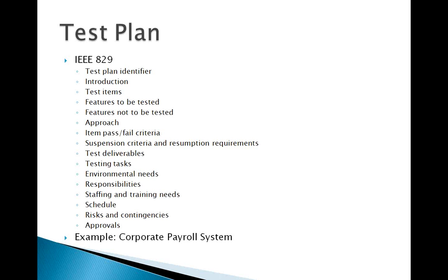once the responsibilities have been defined, you have the number of staff that is needed, and if for this project any particular training need is there. So for example, let's say it's a hosted services solution, where performance is very critical, but you know that the current staff that you have have no exposure to any performance testing tool. So then you need to identify which tool you're going to use, and have a training lined up for them.